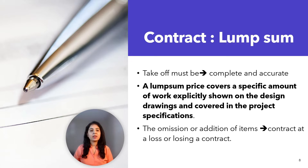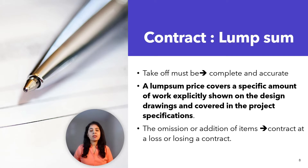The lump sum price covers a specific amount of work explicitly shown on the design drawings and covered in the project specification. The omission or addition of items may result in taking a contract at a loss or losing the contract.